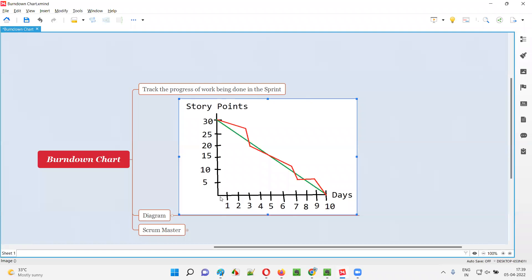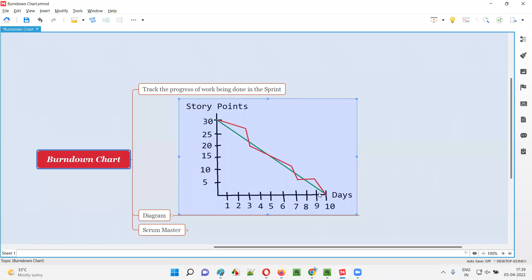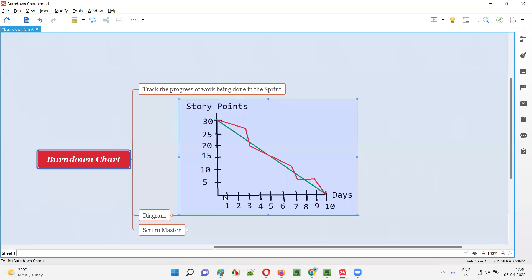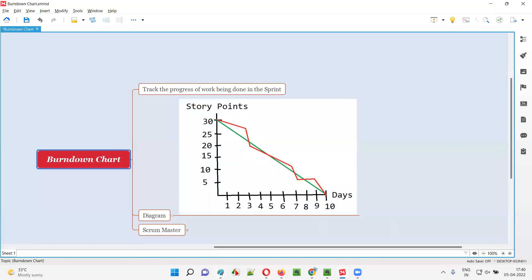On the vertical axis of this burn down chart, you mention the total number of story points — for example, 5, 10, 15, 20, 25, up to 30 total points. On the horizontal axis, you mention the number of days the agile team has to complete the user stories — in this case, to complete those 30 story points.